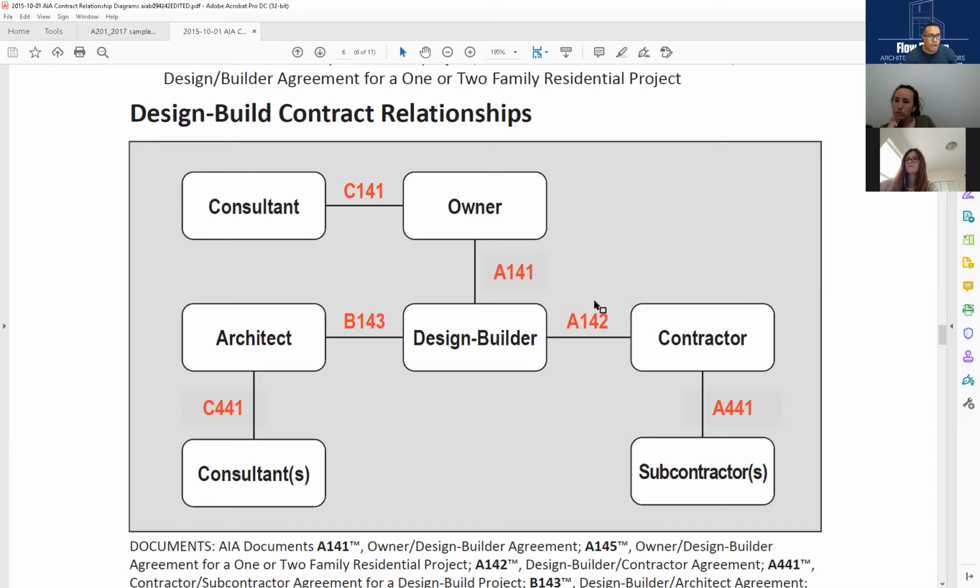So there are two options. One, we proceed with this as it is, and you will have a bouncy floor. We will install it just as per the specifications. Or two, we stop what we're doing right now and issue a change order for time. We're going to modify the time. It's going to be 4 additional days, and I'm going to throw a number at you guys, I don't know, $2,000 more for us to level the whole floor throughout the whole basement. Do you want to proceed with the change? Because time is of the essence, please let us know as soon as possible. I didn't do that.